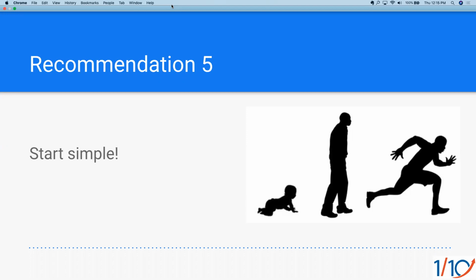Especially if you're new to CRM, it's always a good idea to spend the first phase really just onboarding the system, migrating your necessary data over, a handful of configurations to make sure the look and feel is that of your organization, but really hold off on any major changes after that. And then maybe a short phase thereafter, a couple months, you might want to start with some basic integrations, third-party apps, App Exchange, that type of thing. And then maybe you do some more customizations in a third phase. And I'm not talking these phases being years apart. These could be months apart.